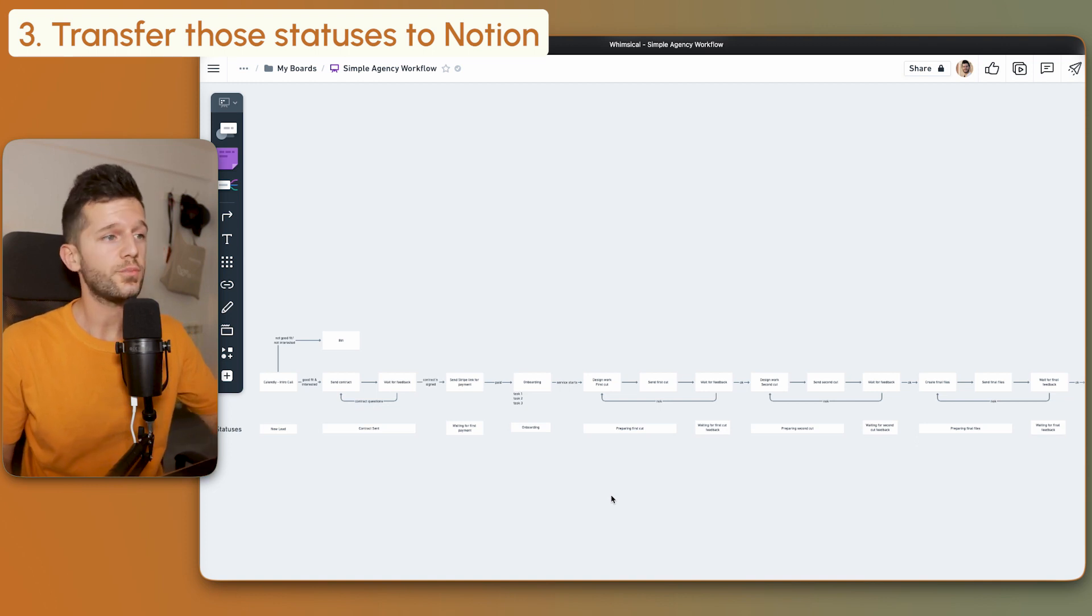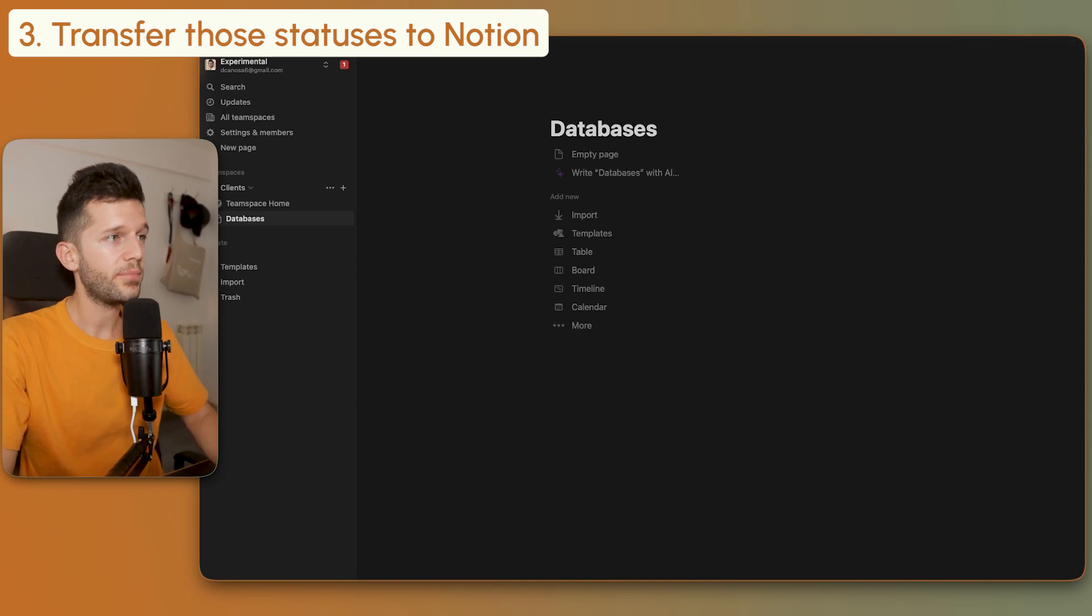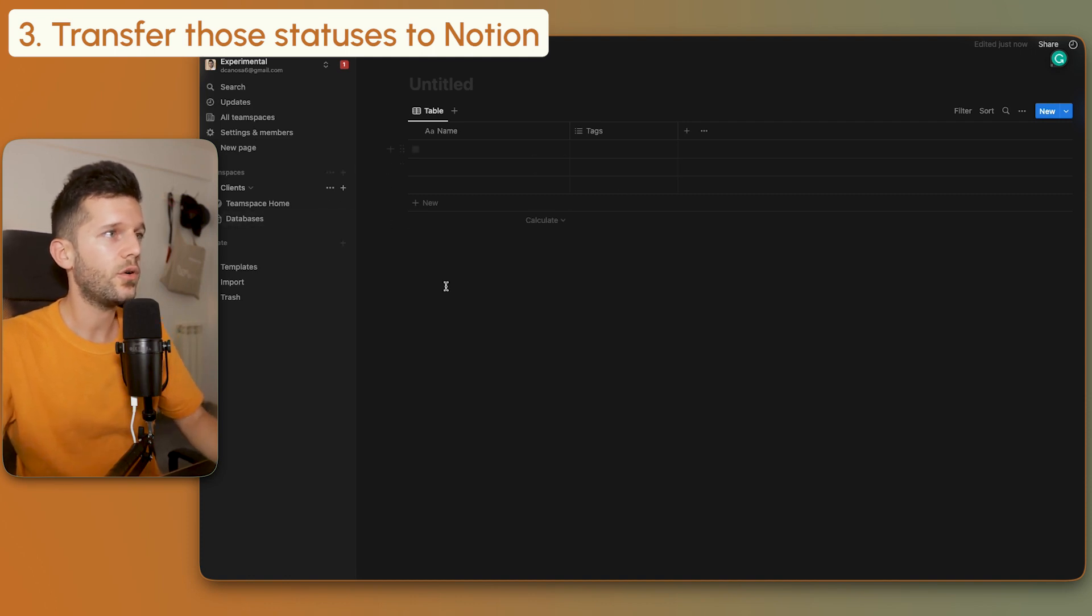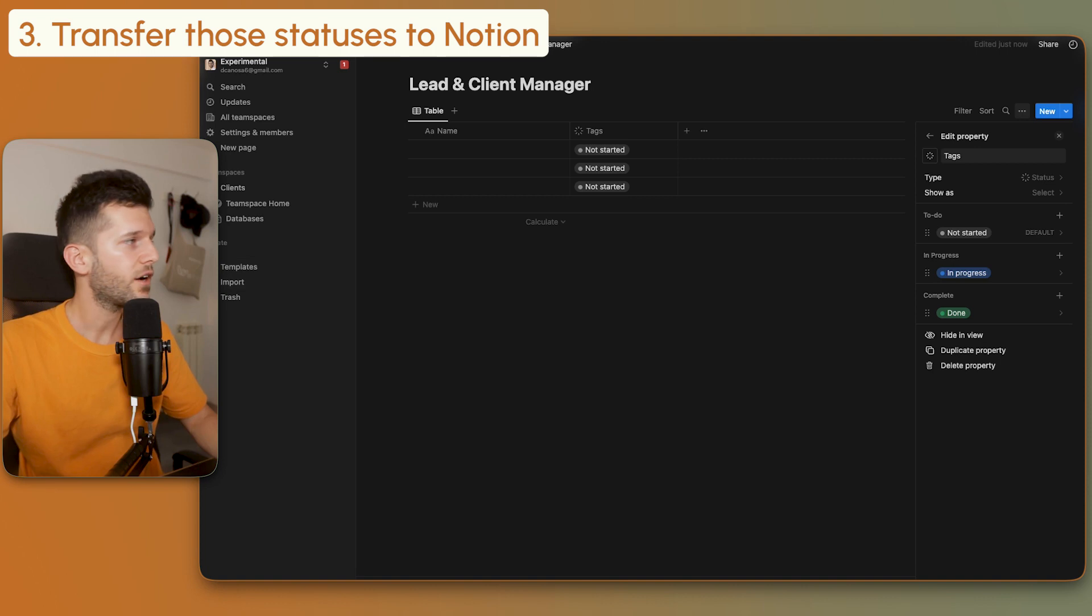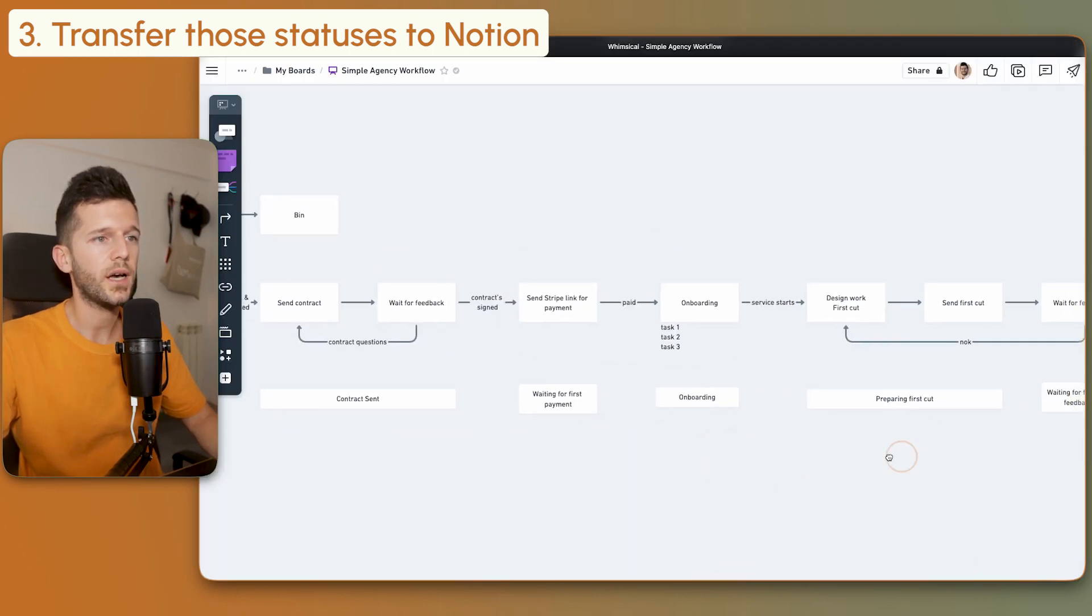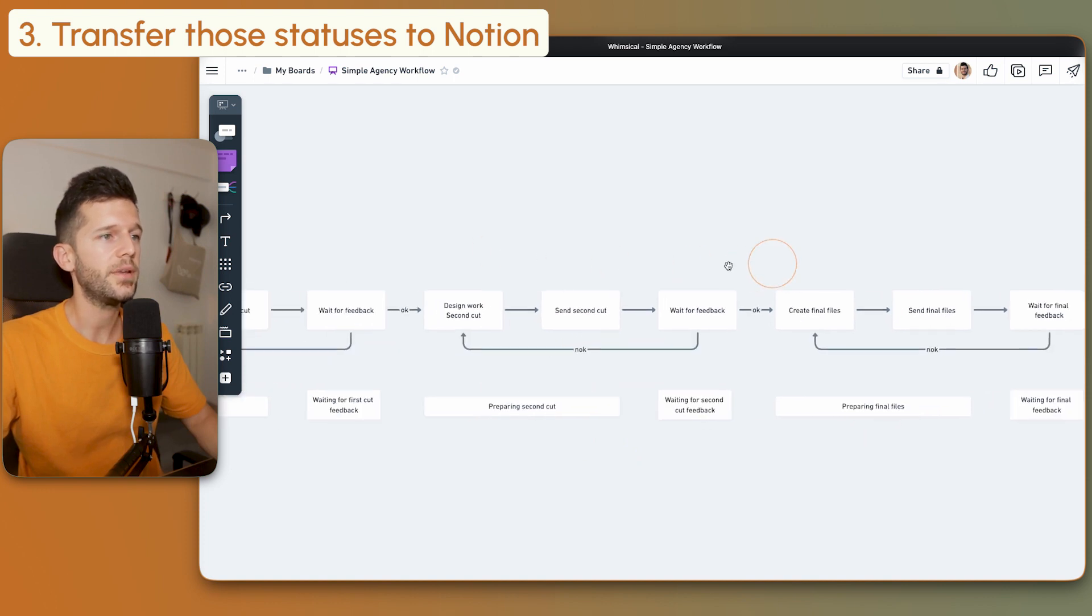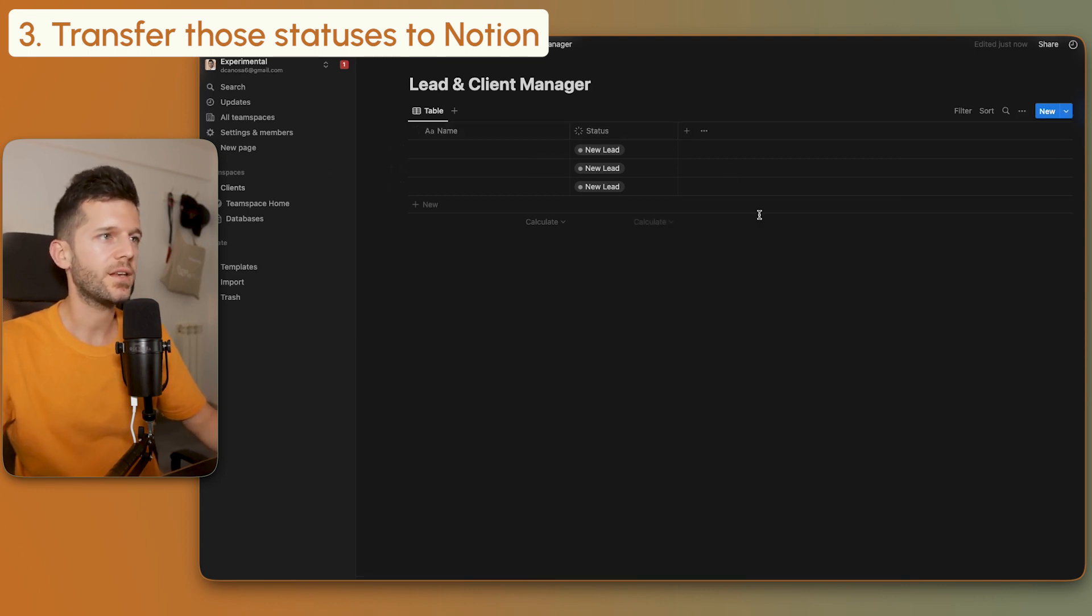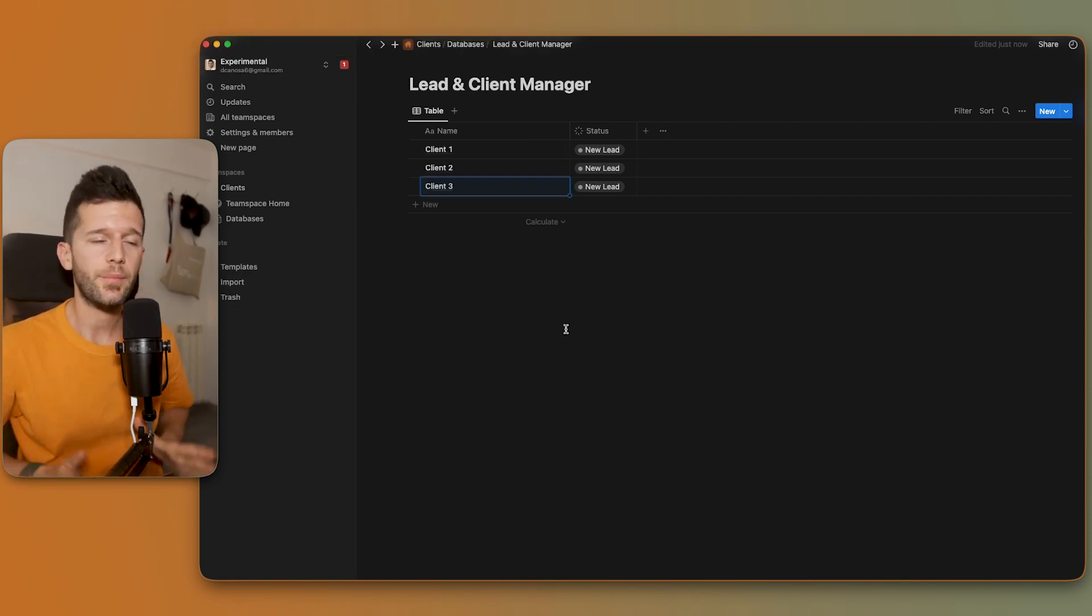Step number three is to bring this into our project management tool. I'm going to use Notion. I'd like to create one page that holds all the databases in the system. This is the only way in Notion that we can see all the databases in the workspace at a glance. Here, we're going to need a status property, and these statuses are going to become all the statuses we created below. Let me do the transfer. We have this over here. Of course, we'll need more properties like client information, but in this video we're just focusing on the process. That was step three.